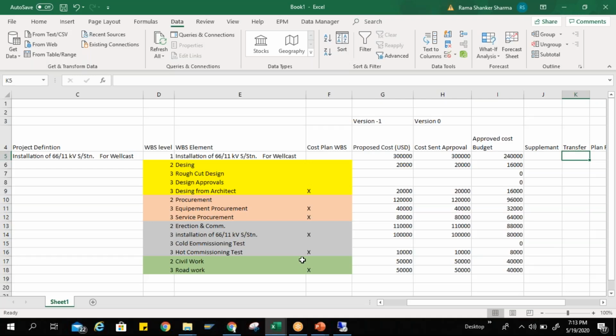So for milestones, we have different kinds of planning. Planning of cost and revenue planning in PS. On the cost planning side, we have hierarchical cost planning where we can directly enter the values. Then we have cost element level planning, easy cost planning, network costing, and CJR2 planning. So there are different kinds of planning for cost itself.